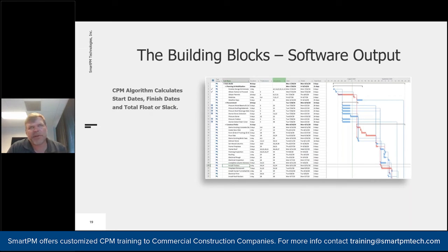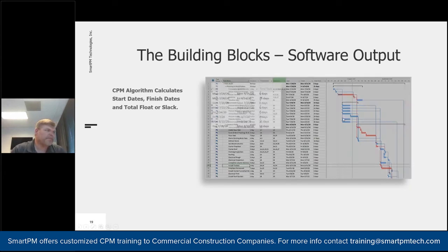And that's very important to note because a lot of times I've seen people try to put their own start dates and finish dates, things that they will say are going to start in 8 months from now, and they'll put constraints everywhere, and they'll basically forecast themselves when something should start instead of listing all the little things that need to happen to get to that point via all the predecessors, all the logic, all the different activities that are required to get you to that point where that activity can start. That's what this program is doing for you, number one.